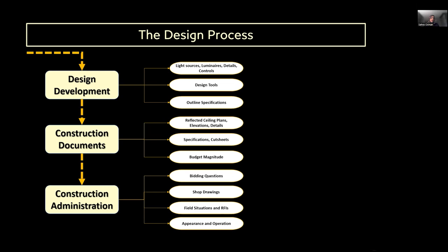Then the contractors take everything and start sending us back submittals and shop drawings. And there are site visits for any field issues. And then finally, there's the inspection and the punch walks, comparing the end product to the design intent and reviewing everything that was built and accepting it or not accepting or demanding corrections.